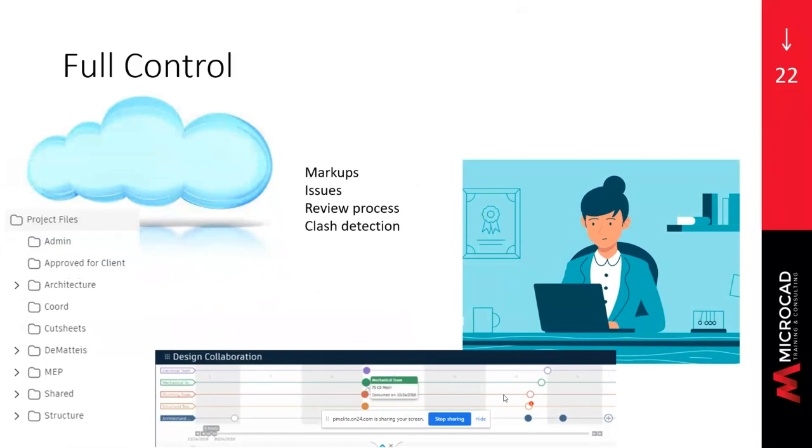This workflow lets each discipline control their data. They control when it's created and when it's shared. And because each update requires the agreement of both the change author and the person using the change data, each model's version is a significant and agreed upon change. The collaboration tools and clash detection provide strong techniques for communication with your partner still.